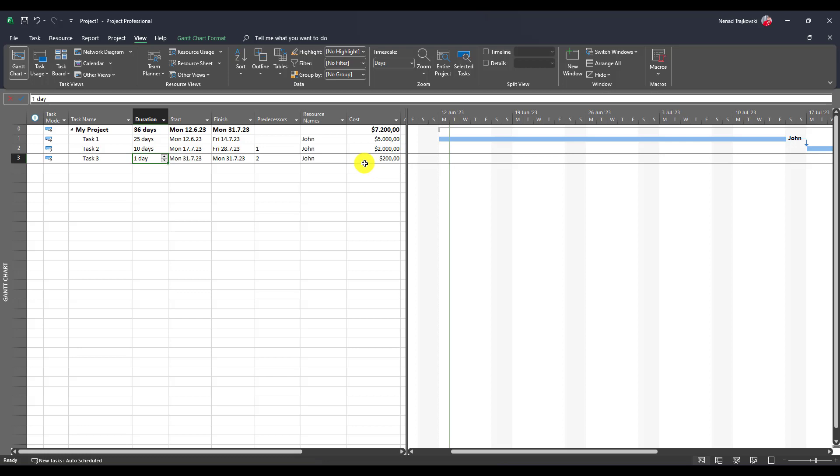But how can we achieve what my blog reader wants? To have $4,000 per month, per resource, no matter how many days are spent in a month. There is no way to do that. There is no way to do that.